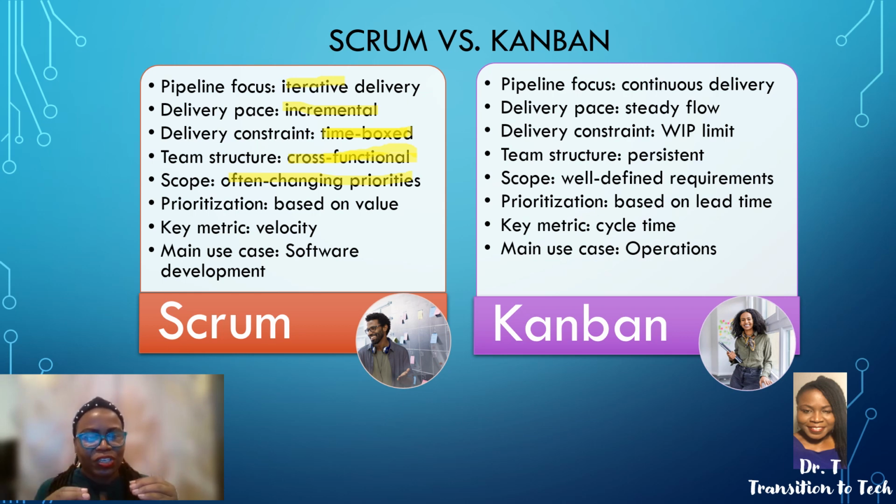So that definition of done, the definition of ready is all of those elements and components that are required are in place so that the team can pull this item, and then how will the increment be accepted? What is the acceptance criteria? What will we need to have in place so that that story could be considered done? So velocity is only measured when those items are completed and the work item is completed.